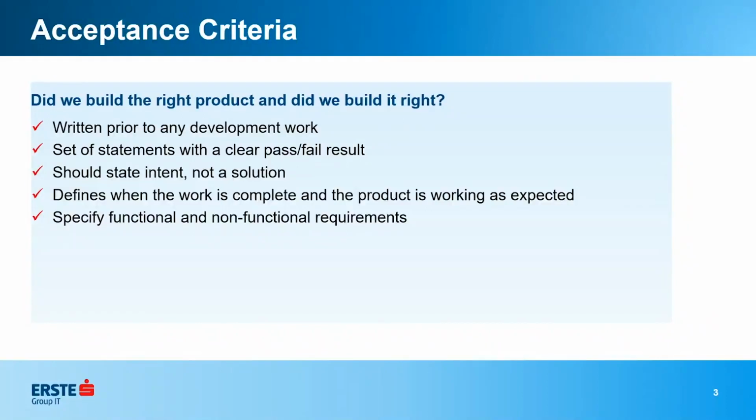Those would be something system-wide, and those should not be in your acceptance criteria because unless you are the team that tests that, those types of requirements wouldn't belong in a user story. The only things that should be included in a user story are things that your team itself can test.